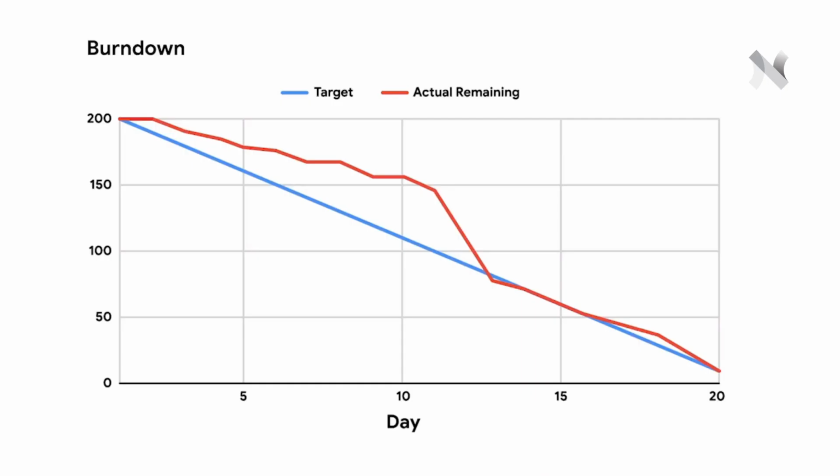Here's an example. Let's imagine our team's sprints are 4 weeks long, which will count as 20 business days. In their July sprint, the sprint backlog had stories that added up to a total of 200 points to be completed. If you assume an even burn of the points over the business days, you'd expect 10 points to be burned each day. By day 5 in their sprint, 22 points had been burned or completed. It's only 25% of their sprint, so maybe things are on track.